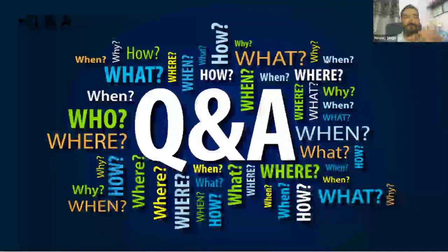Okay, so you see there are three parameters here. We have the budget, we have the time, and we have the scope. Any of these parameters can be kept frozen, and the others can be flexible. Let's talk about scope and time, which are the two major contributing factors in how you run a project and achieve the goals at the deadline. If I keep the scope frozen, I have flexibility on the time part. And if I keep the time frozen, then I have the flexibility to change the scope.